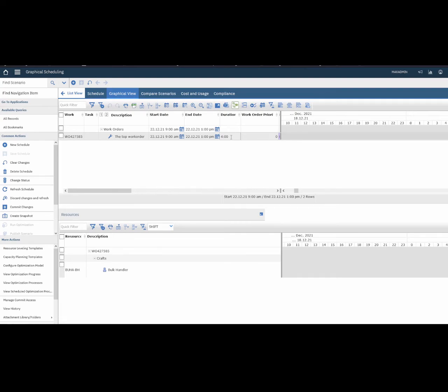So in this case, if we schedule the work order first correctly, we most likely won't have a problem at the assignment stage. But if you then change the assignment date, you want it to reflect back in the schedule tool here to say, okay, these are the dates you're now looking at.